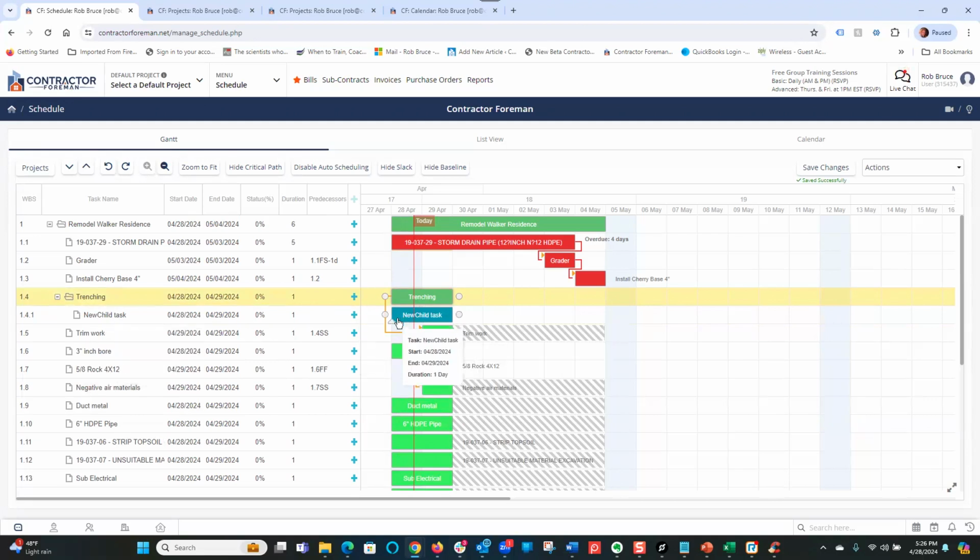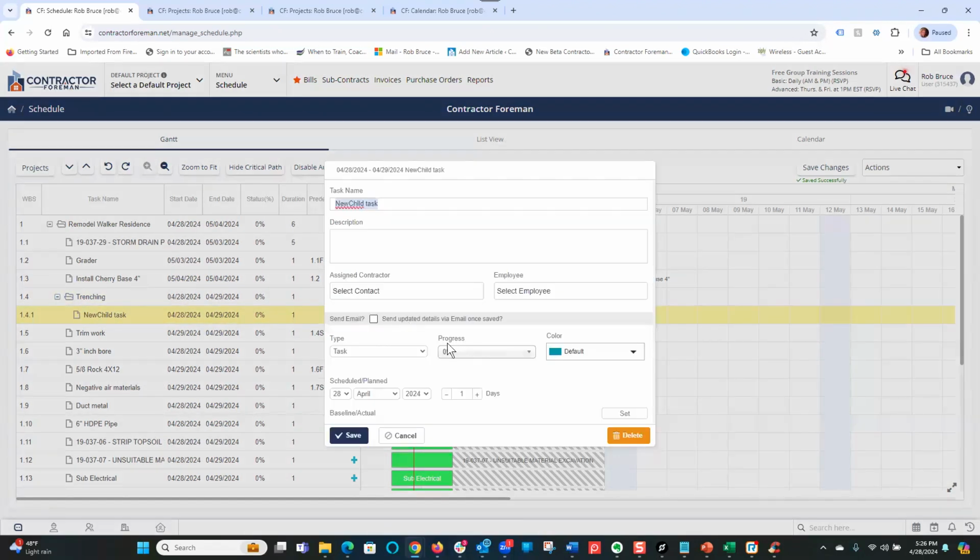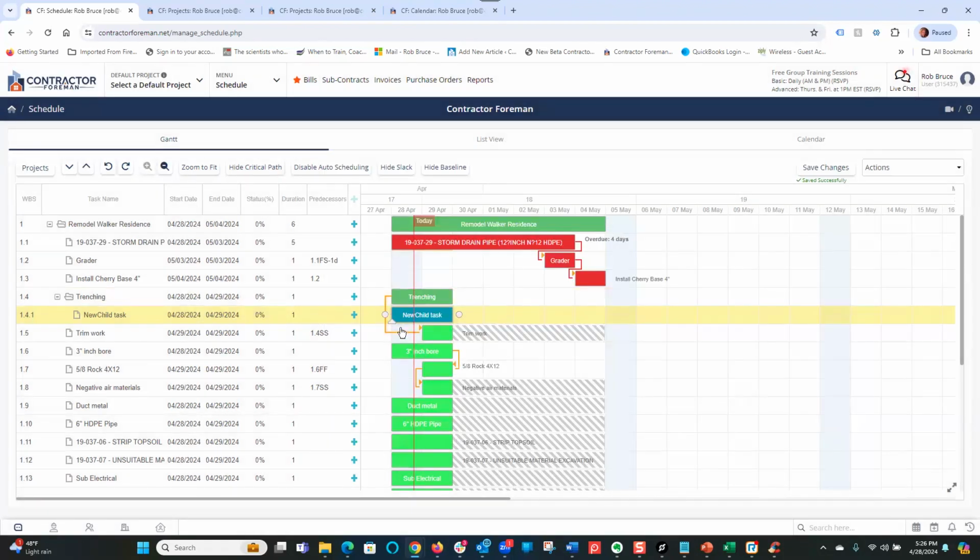And let's say I'm going to update this. So remember, I can update the percentage complete here. We did that. But it's even easier because you don't always have to be dead on exact on these. See the little triangle there? And then my mouse turns into a double-sided arrow. I can just drag that across, and you see how it's changing the color of that. And so now it's showing that I'm a certain percent done.